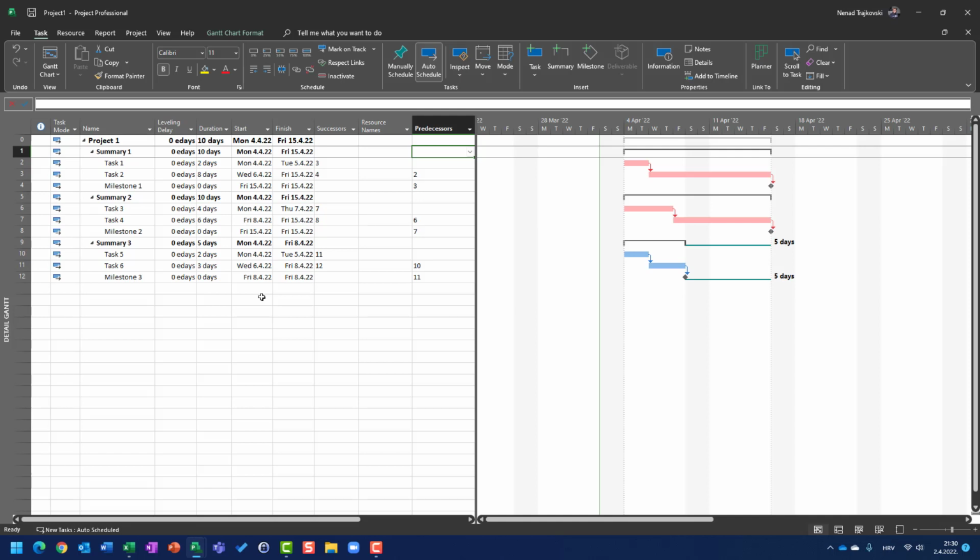And once again, to conclude the whole story, a critical path is a path in which if any task on that path is going to be late or its duration is extended, the whole project length is extended and the finish date is also extended. So the project will finish late, okay?